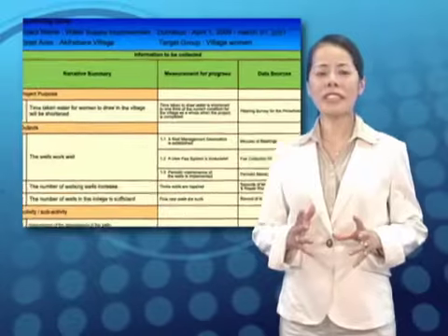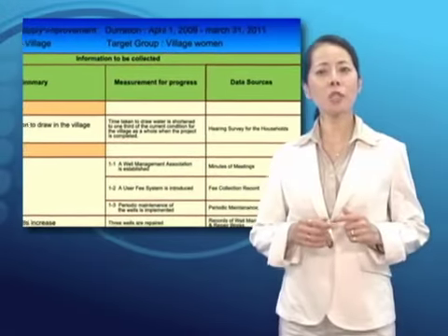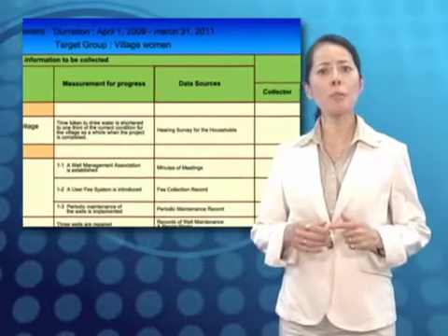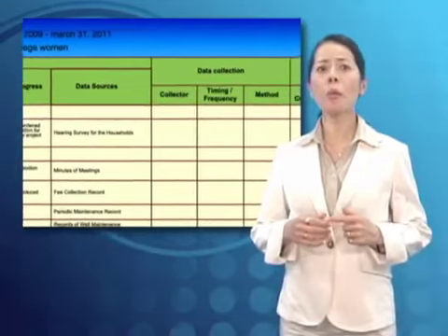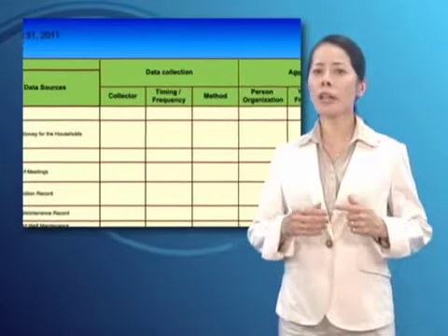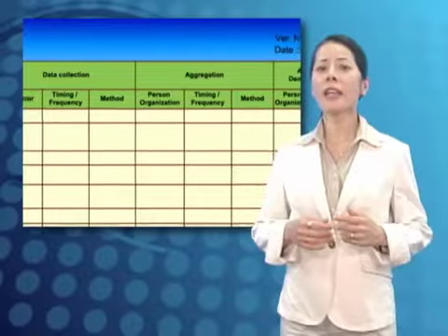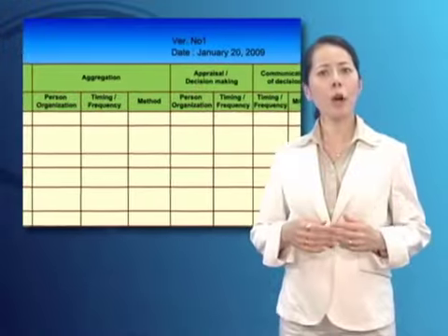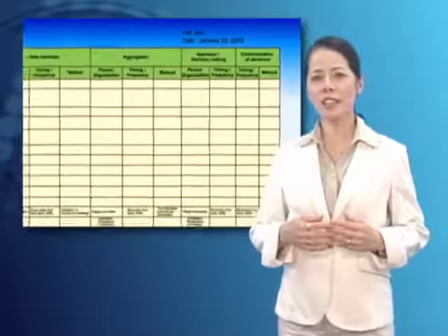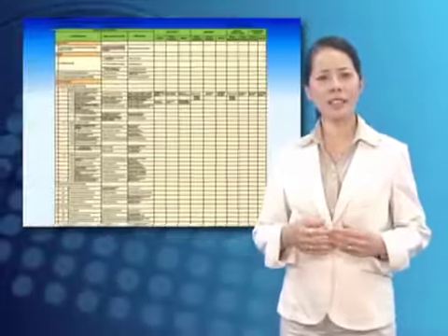Following this monitoring table, progress management is done at the same time as project resource management. Data described on the monitoring table are collected periodically, their results are analyzed, and if deemed necessary, the activity plan of the project is changed. This is how a project is implemented.